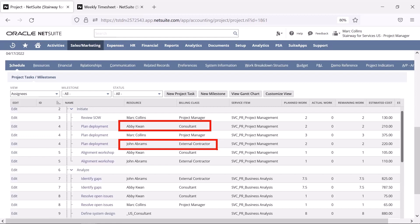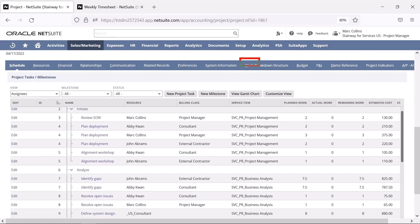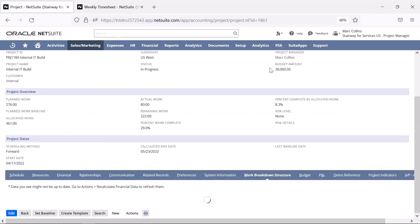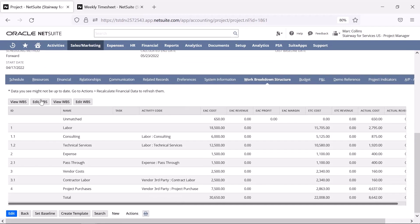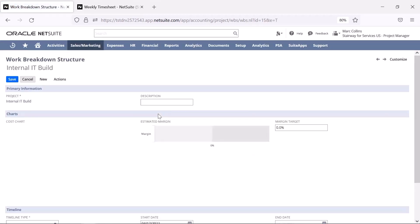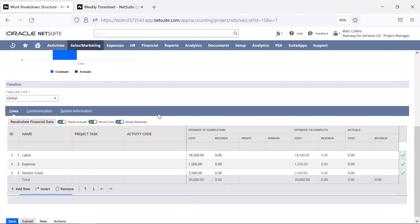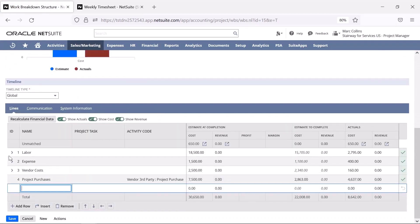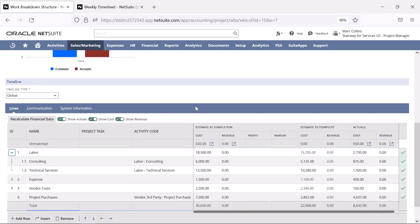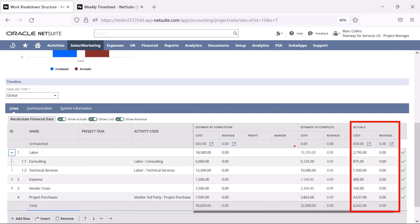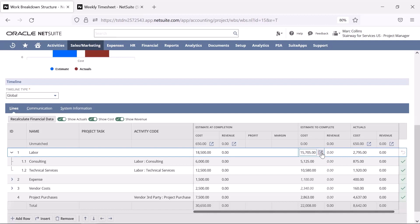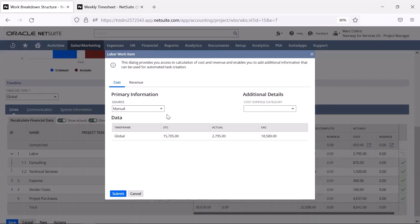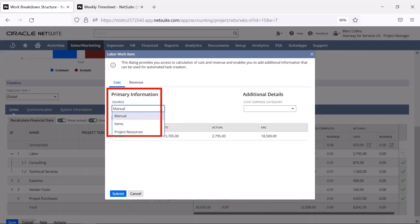If I want to see our budget per category, like time versus expense, I'll use the WBS feature within the Work Breakdown Structure tab. Here, we see a breakdown of our actual costs compared to our budgeted costs in the Estimate to Complete column. The budgeted costs can be set manually per category or calculated based on items or project resources.